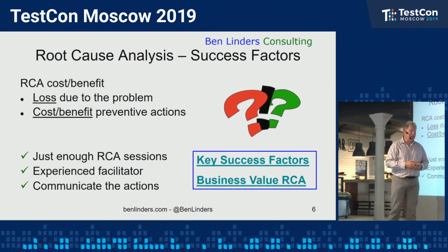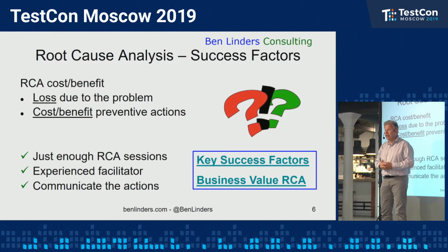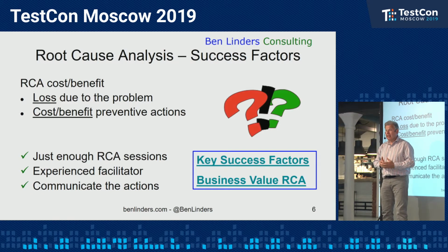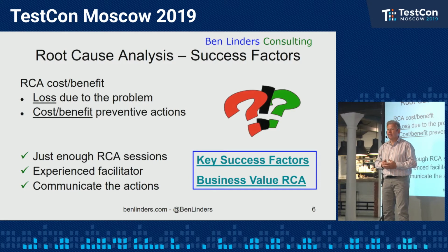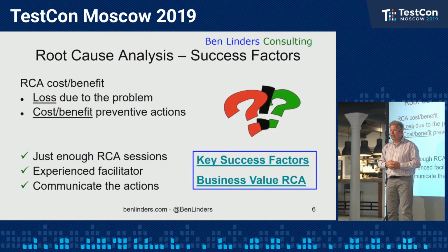So, some of the success factors for doing root cause analysis, and again, this is not only for a retrospective, this is in general when you do root cause analysis in there. I think it's important to do some kind of cost-benefit analysis before you start doing the root cause analysis or as a first step of your root cause analysis. And this is actually pretty easy in most of the situations. In most of the root cause analysis that I've done with teams, you can do this in a couple of minutes. You start asking, what was the problem and what did we lose due to this problem?